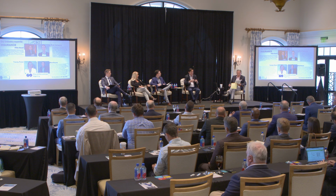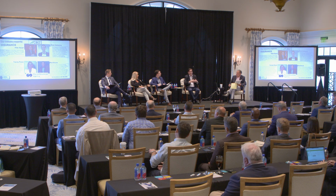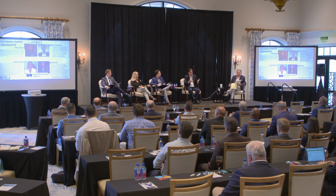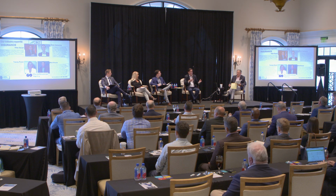So we see a lot of contracts that come in already signed. And a lot of times when that happens, we have to dial it back and say, well, did you look at these insurance requirements? It's not necessarily about budget. Of course it's about budget, but it's also about what's the market availability for this coverage. If you're on a barrier island and your contract says you need to insure the full project for flood, is that even available right now, or is it even affordable?